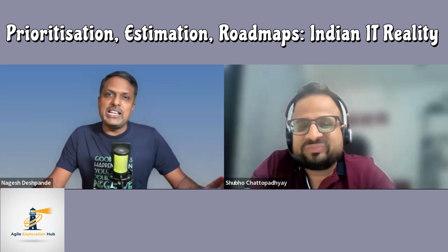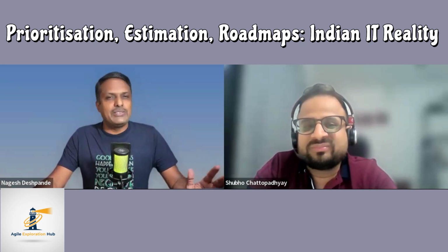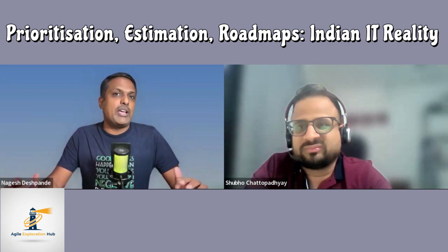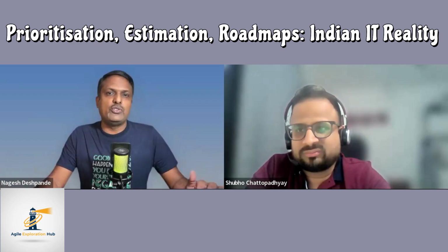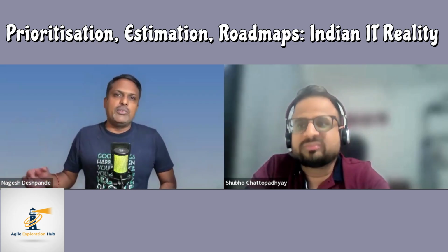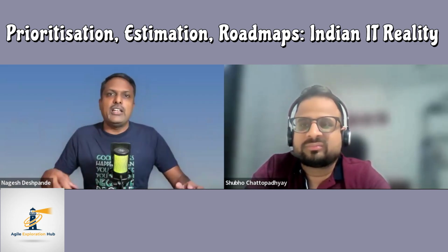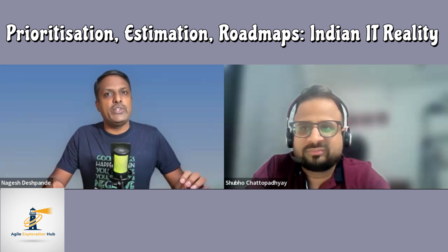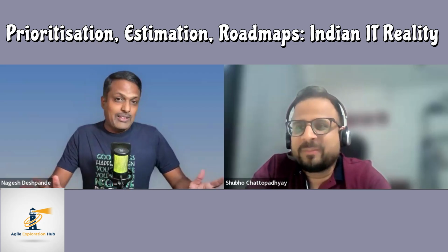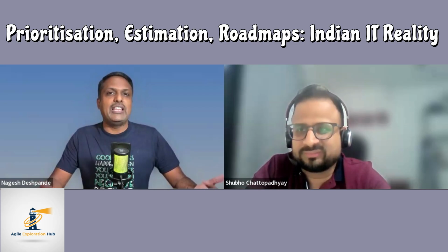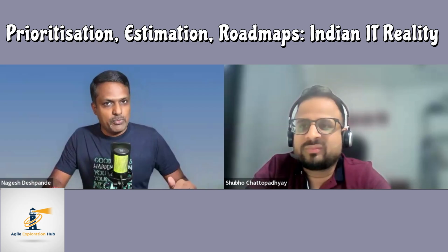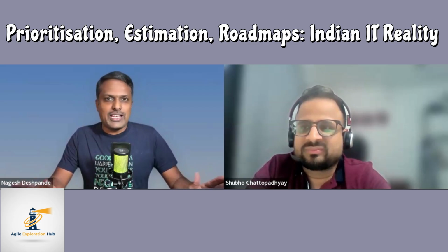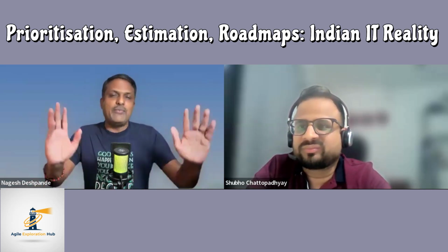And with RFPs, there is a funny incident I'll share. It happened a few years back, and we were building a service where we had to incorporate a service from Microsoft. The entire team was assuming that it would be done in like 3 to 6 months, and everything was done. The POC was done, and then the project got kicked off. And we later came to know that Microsoft was planning to release their feature after 8 months. Dependency. So the project that we planned for 6 months, and Microsoft was going to release the feature we wanted to incorporate, had no timeline match. Then we had to go back and forth, and the contract got cancelled, the team got reshuffled, and then we got some other assignment from the client.